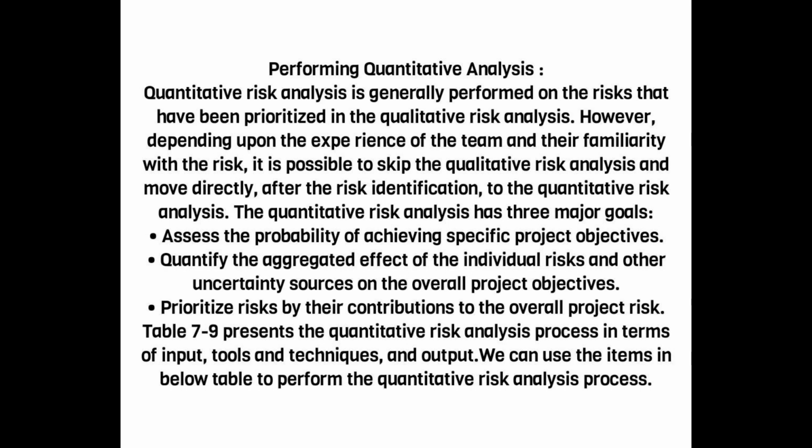The quantitative risk analysis has three major goals. Assess the probability of achieving specific project objectives. Quantify the aggregated effect of the individual risks and other uncertainty sources on the overall project objectives. Prioritize risks by their contributions to the overall project risk.